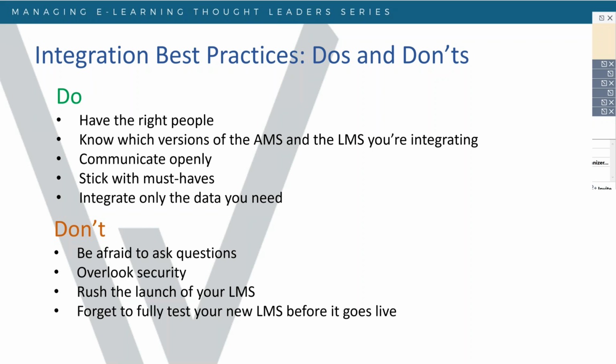Okay. So I actually had this point because when I engage in projects with clients and with our vendors, I want to stay on task and stay efficient, so we don't run into problems with timelines and changing requirements. Really, your must-haves should be defined at the beginning stages. These are things that are critical for the functionality of your LMS. Maybe an LMS has all the functions, bells and whistles, but maybe that's not something we could get integrated in the initial phase, or you don't have the time or the resources to do so.